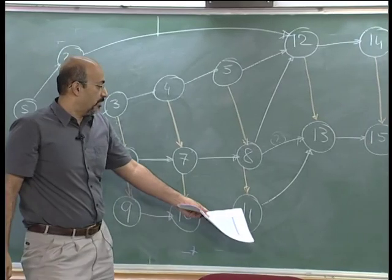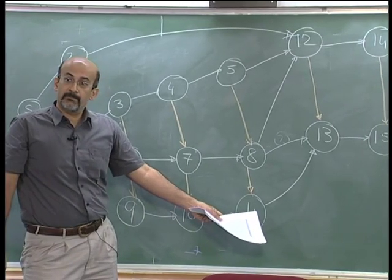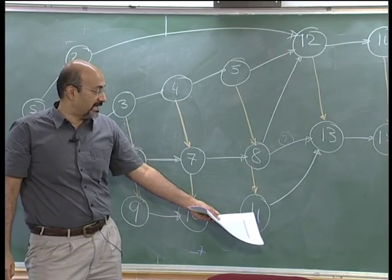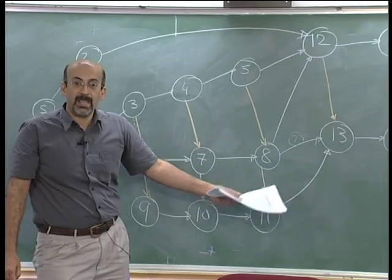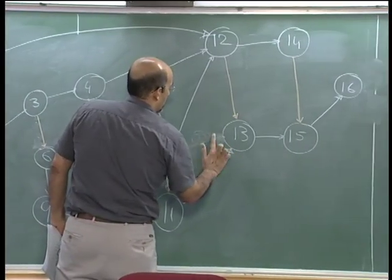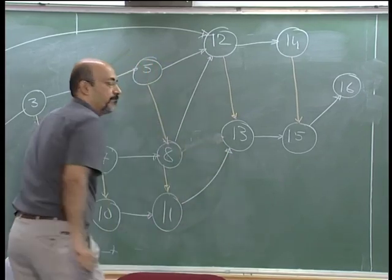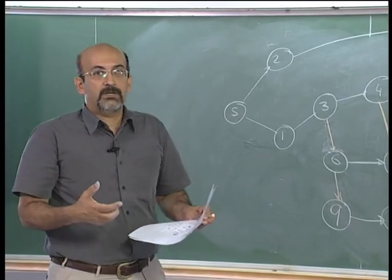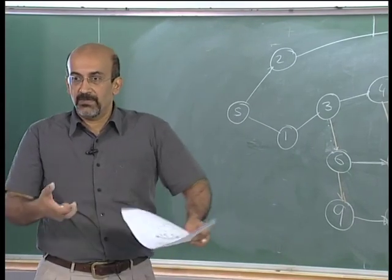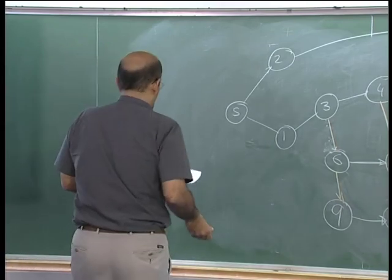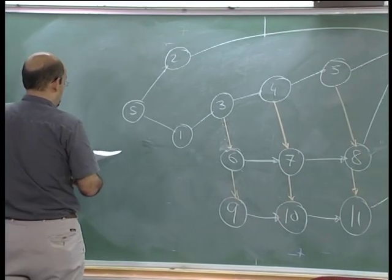What about my 8 to 13? Unless, if I am doing 11, it means? Not required because if I am finishing 11, it means I have finished 8. So this is an error relationship is also not. So as the network gets more complicated and as you start bringing resource flows into it, you will have to look out for redundancy in the process. Durations are the same.